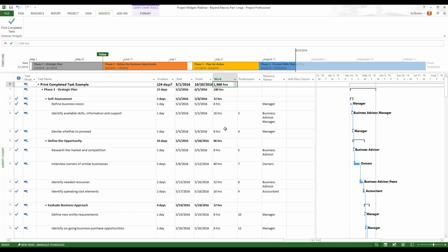Well, suppose you start a new project from a template, but this particular project is of a much greater complexity than the typical project you work on. So those work estimates in the template are very understated compared to what they actually need to be for this real project that you're about to start on. So suppose, for example, we needed to increase the work for all the tasks by 50%. So instead of 8 hours here, we'd add an additional 4. That should turn into 12 hours, right?